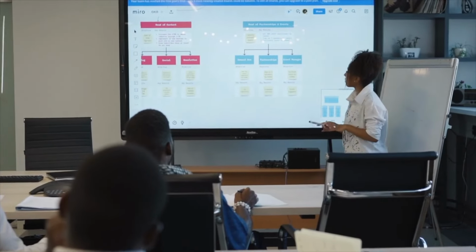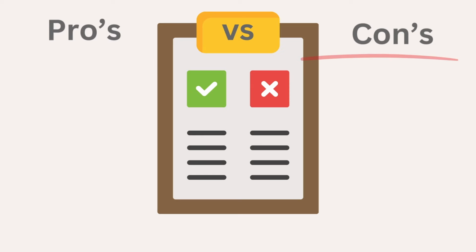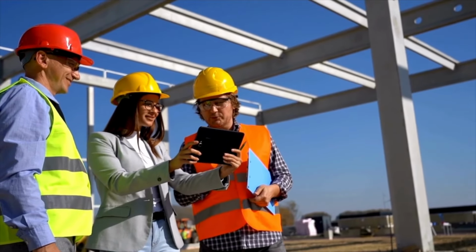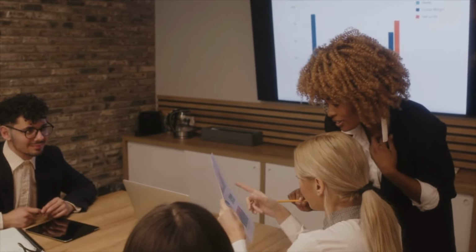And because it's based on a common way of working, it's easy to train and your team has a common language for how things work. Continuous delivery Agile also has some cons. Something similar to what we already see with Agile. Not enough documentation, not enough clarity on timing, and difficult to transfer to operations. And of course, in these situations, you can mitigate the cons by actually creating a work stream for documentation, for handover, and create that solution based on the value you're trying to create.